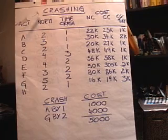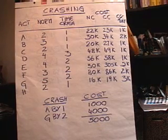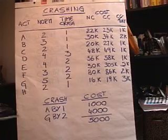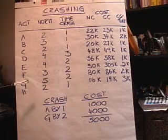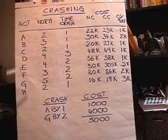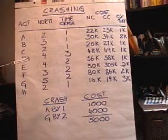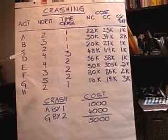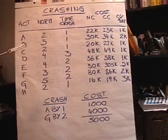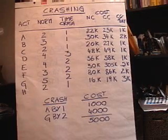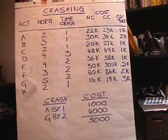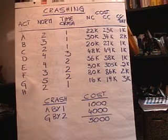What this video is about is crashing projects — that just means reducing the amount of time for a project to take. For example, the normal time on this project was 15 days, but let's say that we'd like to get it down to 12 days instead. So we need to crash by a total of three days on that critical path. This is a common occurrence if you need to complete your project faster than the normal time.